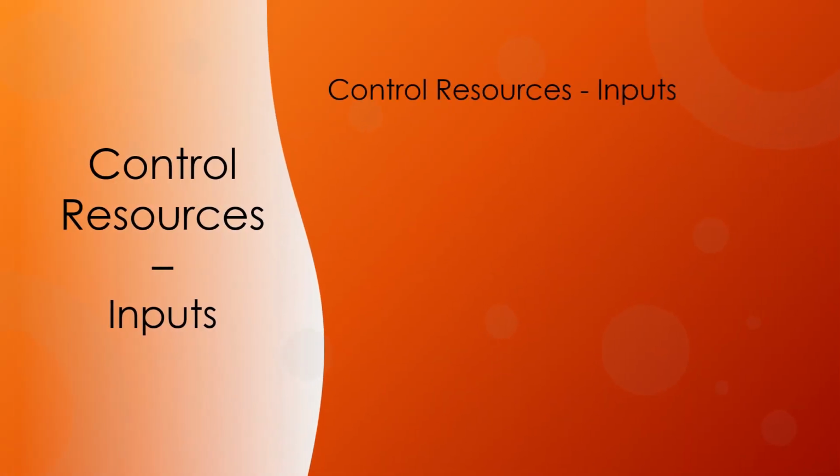In this lecture, we will be discussing the set of inputs, tools, techniques, and outputs to the process of control resources. The set of inputs consist of components of project management plan like resource management plan, project documents such as issue log, lessons learned register, physical resource assignments, project schedule, resource breakdown structure, resource requirements, and risk register, work performance data, agreements, and organizational process assets.